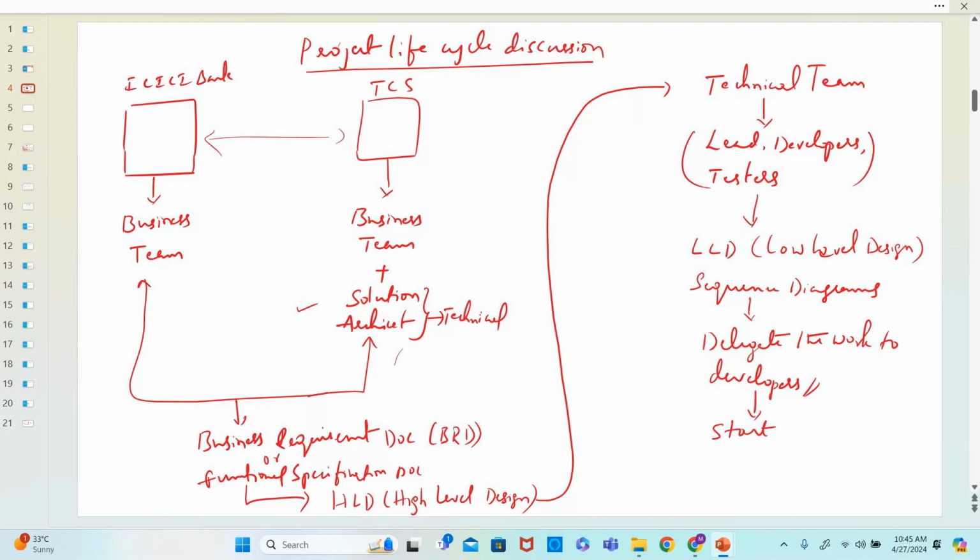Now he will put easy ones at approximately 7 to 8 working days for entire development, medium ones at 10 to 12 working days, and complex ones at 12 to 15 working days. Now he has already categorized each API or integration as easy, medium, or complex, and he has the estimation of how many working days are required. He'll sum up everything and come to a conclusion, right?